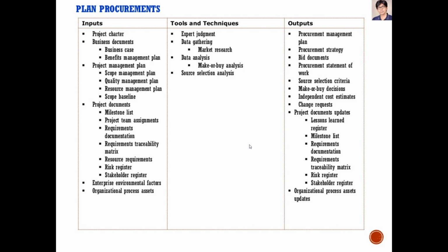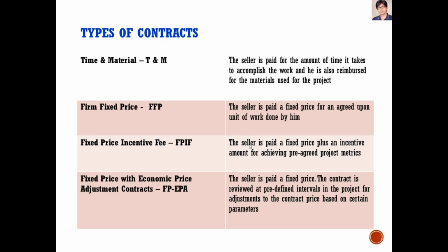And that may include, we realize that we got a low bid from Joe Blow Contractors, but we look back in the lessons learned from other projects and we say, hey, they bid and got the award for projects previously and they did not deliver on that award, and we could then disqualify them from our bidding process. So that lessons learned gets really important in this procurement phase when we're trying to figure out how to get resources.